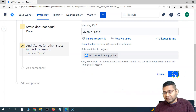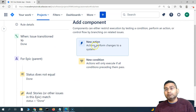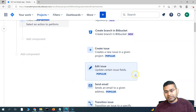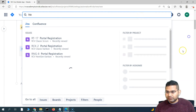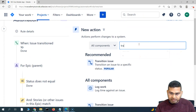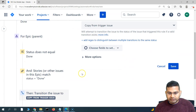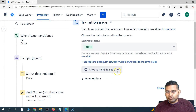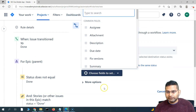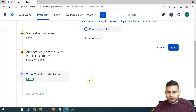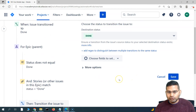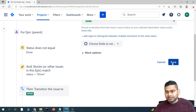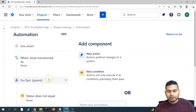If those conditions are met, we then perform the action: transition the epic to Done. So we add a Transition Issue action and set the transition to Done. You can optionally set specific fields there as well, but this is all we need for this rule. Save it — the rule has been saved.